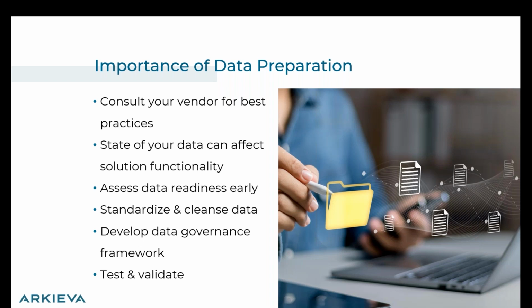So many a times we see that supply chain planning projects actually have a pre-project in front of them that cleans up the ERP data, be it SAP, be it Oracle. And sometimes it's cleanup, sometimes it's changing the processes internally with the company so that, for example, production is reported on a more routine basis, so not once a week, but potentially once a day or potentially once every 6 hours. So all these governance frameworks might need to be updated. Eventually, to make sure your data is good, you want to test and validate.